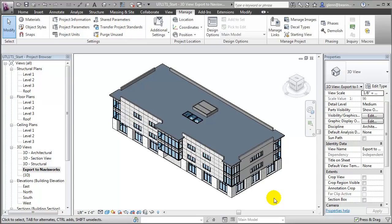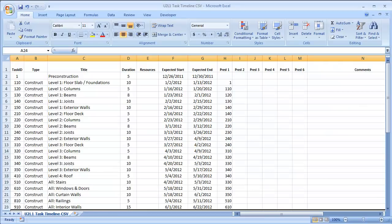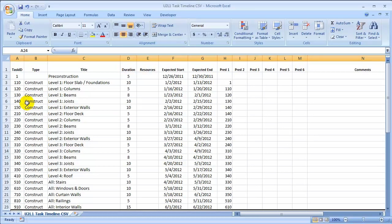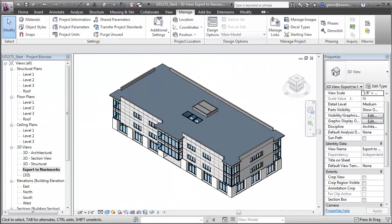Having created this parameter, our next step is to select all the building elements that will be associated with tasks and fill in that value. To do so, we can return to the Task Timeline document and review the Task IDs associated with each of the different elements. For example, for the Level 1 columns we're using Task ID 120, for Beams it's 130, and for Joists it's 140, and then return to Revit to enter those values.